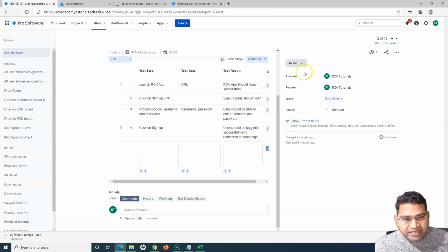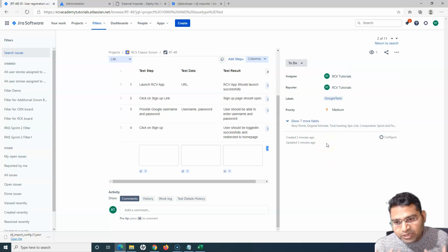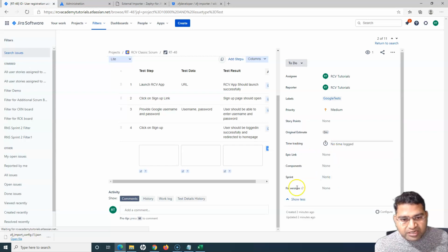Okay, in case you are having issues with some of the fields, for example, I have explained about the assignee, and if it's not able to identify the name that you provide in the sheet, it will give you an error, then you have to find the actual ID. Similar might be the case with the sprints as well, right? Sprint is also stored as an ID internally in Jira, so you might have to provide the actual sprint ID and not the name of the sprint.